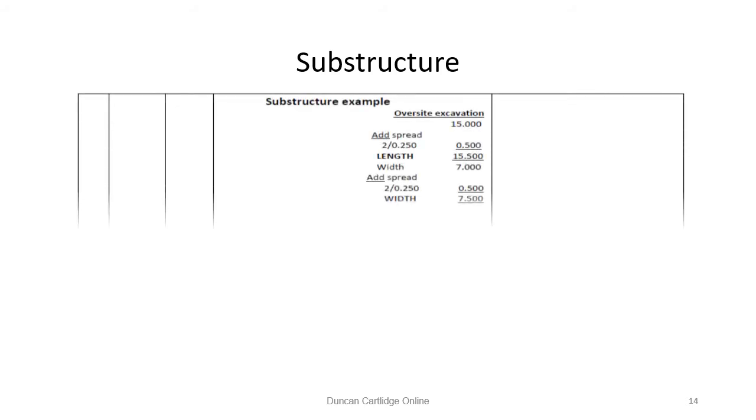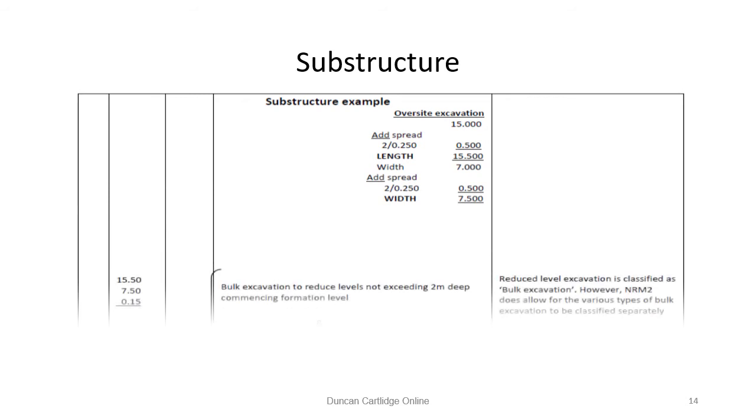So here we go with the worked example. In this case, we are using traditional setting out. In other presentations, spreadsheet applications will be used. It may be a good idea to print off the drawing on page 11. To the external dimensions of the walls, we add twice times 250mm to give the overall area of the excavation: 15.5 by 7.5. The reduced level excavation is 150mm deep.